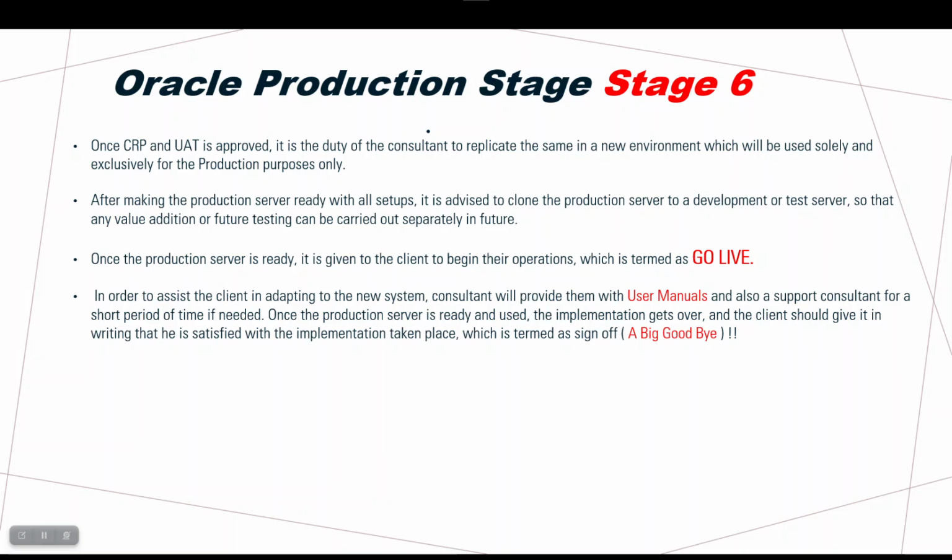And also you will deliver all of the documentation: business user manuals, documentation setups, as-is document, to-be document, the technical document, because it will be a reference with the client in case in the future they bring any new implementer, so they can show them these documents to tell the new implementer how the previous implementer implemented or what they did in this project. All of the documents, user acceptance, BR100, we took a lot of document codes, right? All of these documents must be prepared and provided to the client in the latest version, so that it is a good goodbye relation between you as the implementer organization and the client.